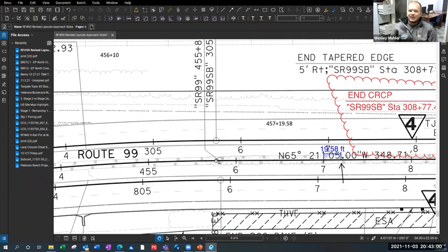And sometimes that decision isn't super easy. So you have to really calculate out your loop times, how long it takes you to move material from here to here, to figure out what is the most efficient way to do it. Do you have enough room for that piece of equipment? Do you have to get it on and off the freeway every night? How many trucks does it take to do that? There's all these different factors at play that equipment adds to heavy civil construction that you don't have.